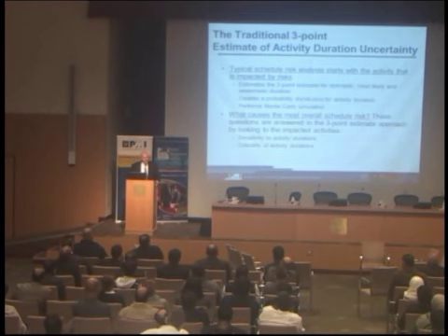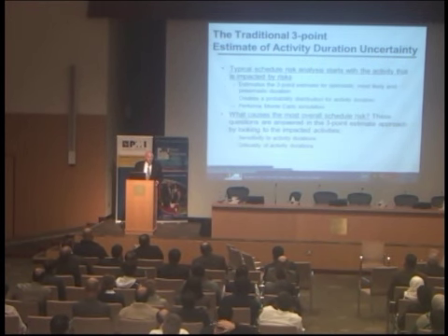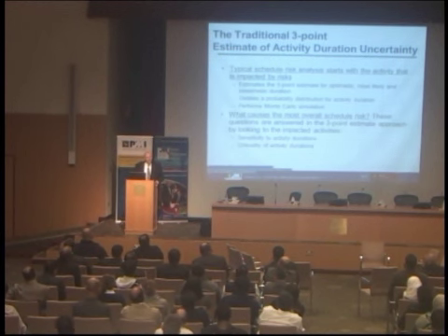But you and I know that that's not the root cause. The root cause is whatever causes the estimate to be uncertain, and that is usually a root cause risk. And sometimes a risk will affect multiple activities. So to get the entire effect of a risk on the project schedule, which is what we're talking about, you have to look at the risk as it affects multiple activities.